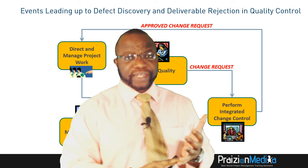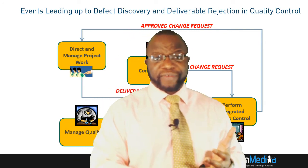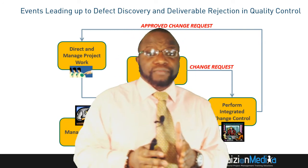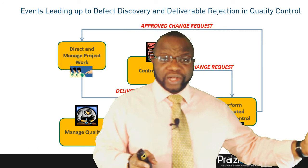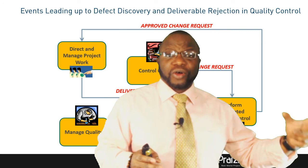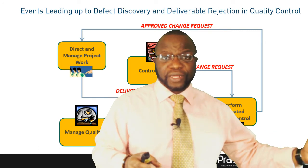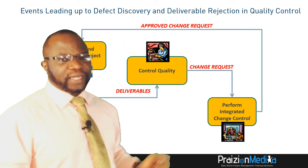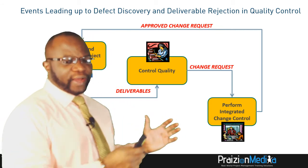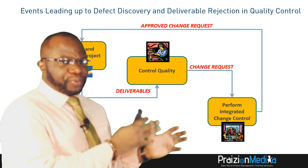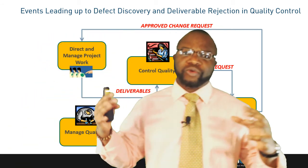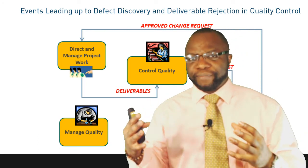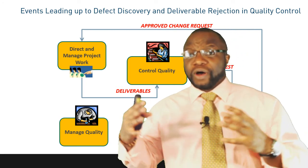It's very important that you realize in Direct and Manage Project Work, there are three possibilities of what this change request could be: it could be corrective action, it could be preventive action, or it could be defect repair. Other dimensions of the project could also have updates raised in an approved change request. So when you look at these processes, it is important to view them as an interconnected web of events.